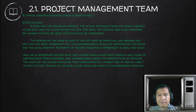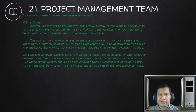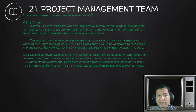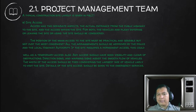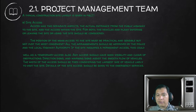When you say site access, it has two separate aspects: the actual entrance from the public highway to the site, and the access within the site. The position of the main access must be practical and sensible. All arrangements should be approved by the police and the local highway authority if the site requires permanent access. Any access should have good visibility, clear of obstructions, with direction signs and warnings to assist the smooth flow of vehicles. When planning your site access, you must make sure it is sufficient for the biggest type of machinery you plan to use — for example, if you're going to use a site excavator or a full-size dump truck, you must already consider their size.